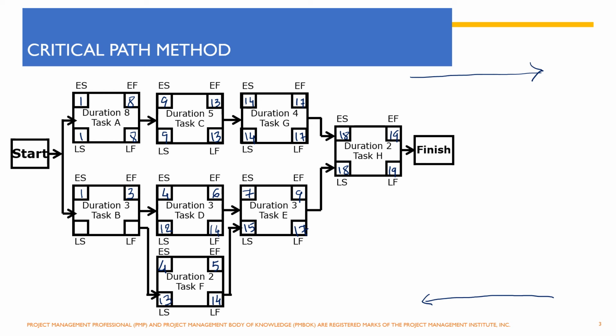Now in order for activity D to start on 12th, activity B must have been completed on 11th. Though this needs to be started on 13th, but since both these activities start after activity B, so the latest finish date for activity B should be 11th, and since it requires 3 days, so this will be 9.